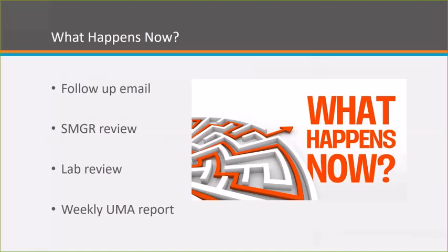On a weekly basis, every Monday, we have a report that's generated to us here, and we look at all of the outstanding UMA sample records. If a UMA sample record is outstanding and it appears to have all the pieces of the puzzle, the materials have been identified, the producer supplier identified, and the acceptance method identified, we'll forward those on to the responsible lab so that they can make sure that they follow up and evaluate your records.